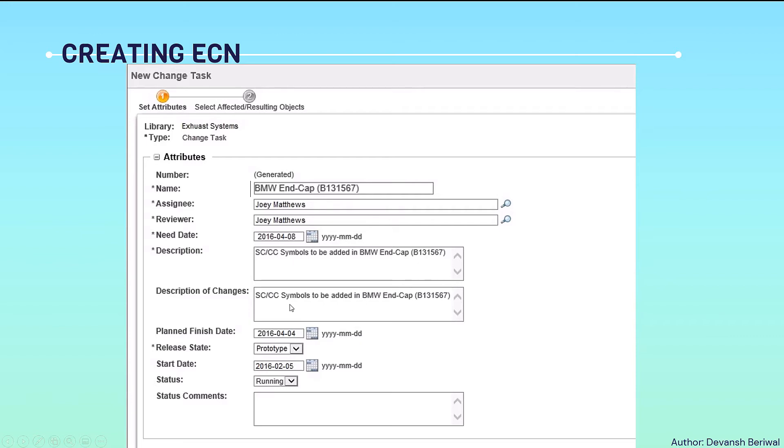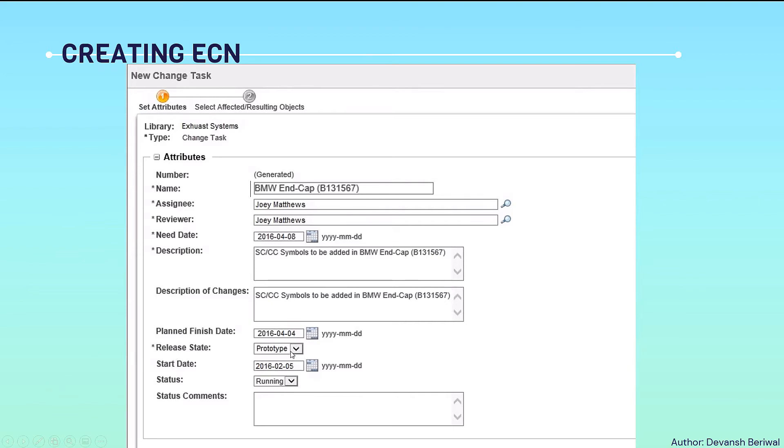In description, we will copy the same description and paste here. Although there is no star on this, it's still okay to fill the information. In plan finish date, always keep the plan finish date a day ahead or a week ahead. In the release date, we will state the release date mentioned in the change request. Everything will be aligned as a change request.